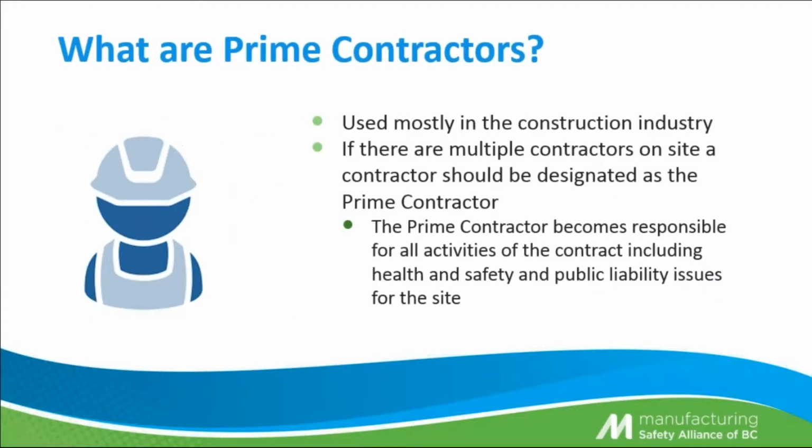Next on the list is prime contractors. And I'd like to cover this from two angles. As a business owner, if you were going to hire a contractor to build a new maintenance shop on your site, you might hire a general contractor to be your prime contractor. He will organize the safety on that site and deal with the subcontractors for electrical and plumbing and concrete and other contractors. The prime contractor becomes responsible for all activities on the contract, including the health and safety and public liability for that site.